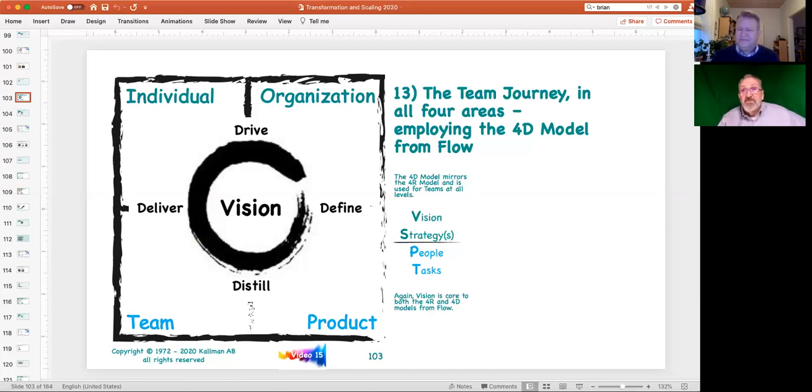The place that you will die, and you will die in screaming agony, and people will be calling you evil names for the rest of history, is if you rush out and start building data solutions and try to iterate a data solution. Because the problem with the data solution and data architecture is it's the foundation on which everything else is built. Yep. So you start iterating that user interface on top of that data structure.